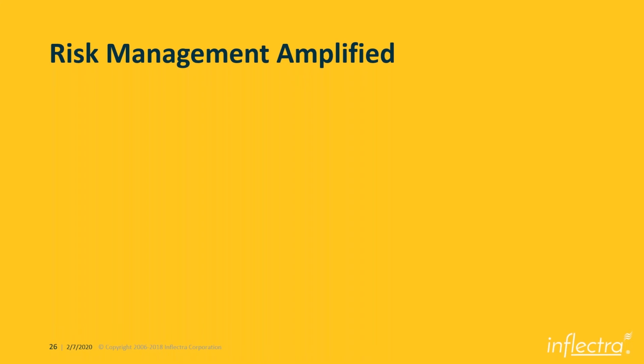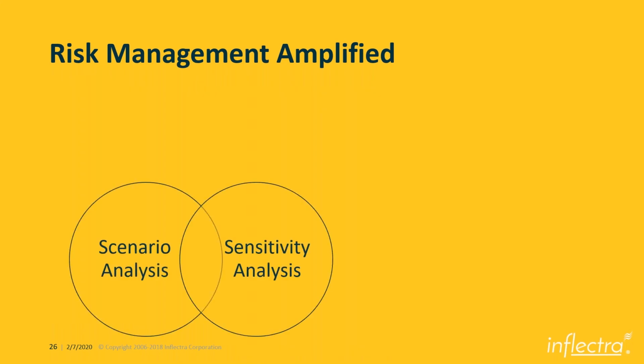So here we are amplifying the simple risk management information that we did. From there, we are moving forward. You need to have multiple scenarios too. You cannot do sensitivity analysis without completely doing scenario analysis. They have some symbiosis together. So you do the scenario analysis, see what some of those things are, and then move forward with sensitivity analysis.